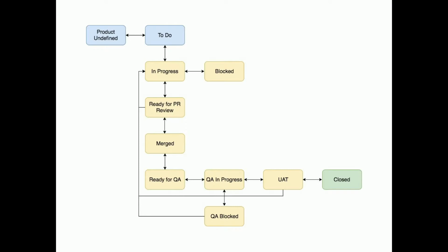But from here, we've added another status, which I think is fairly common, which is the blocked status. You have tickets for various reasons that are going to get blocked. But on this specific project, because it's upkeep, we had a lot of them that got blocked. And it's, again, creating that visibility of developers not just sitting on this ticket taking too long. It's blocked. It needs something. So we had that status created there. Going down again, reviewing the pull requests, down into merged.